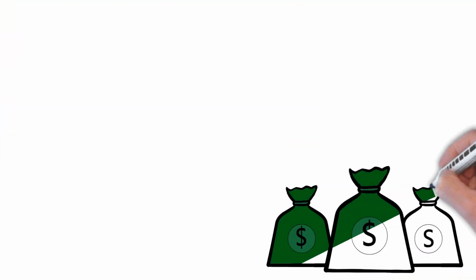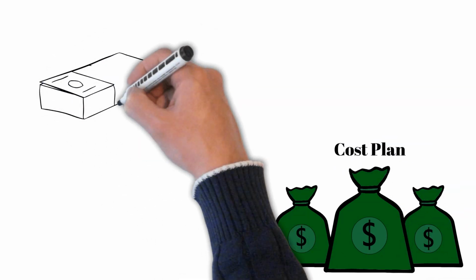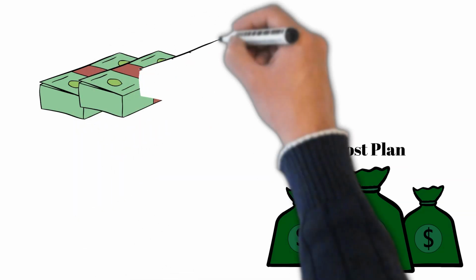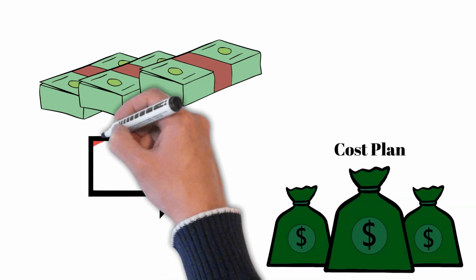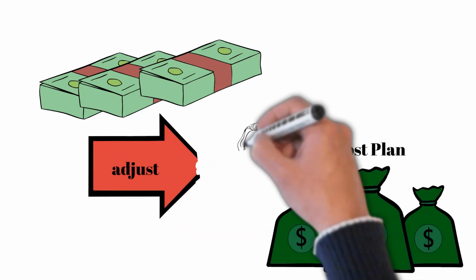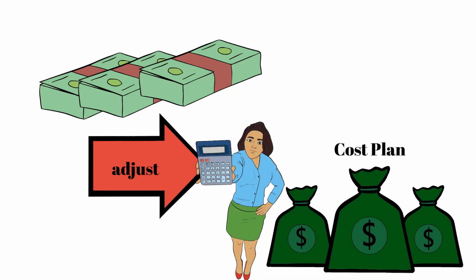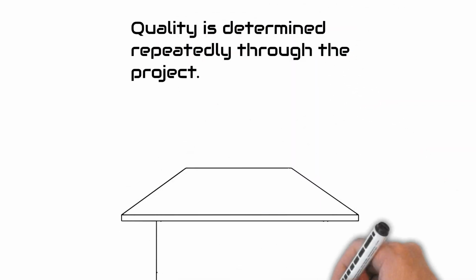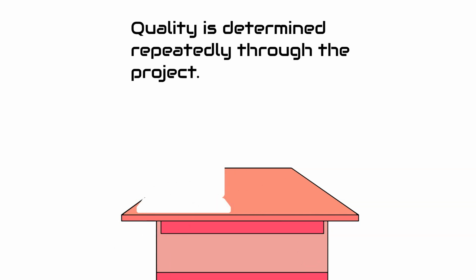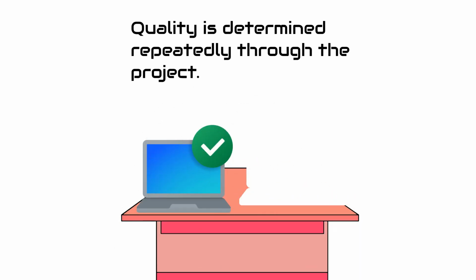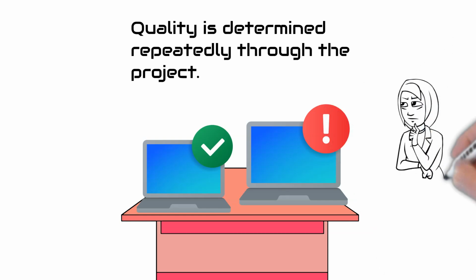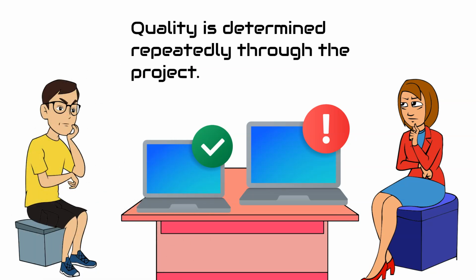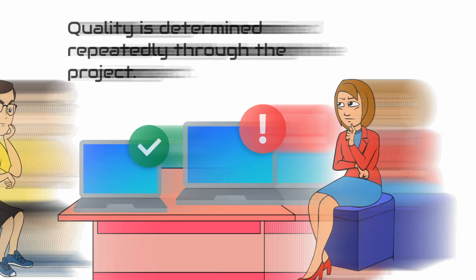Cost management. In traditional project management, cost is estimated ahead of time, and we use the earned value management as part of the regular reporting. In the Agile framework, a more top-down approach is taken, as the details are unknown and should remain undefined until an incremental portion of the value is to be delivered. Quality management. Traditional project management framework requires a quality management plan, while in Agile project management, the team defines the specific requirements around ensuring a quality product is delivered. In Agile framework, a working product is the ultimate goal. Fit for use is determined repeatedly throughout the Agile approach.